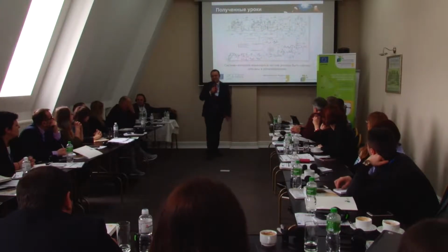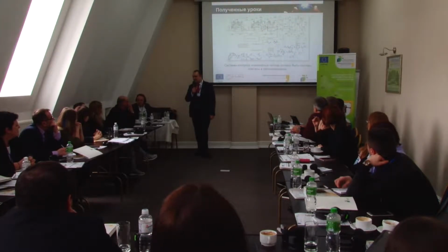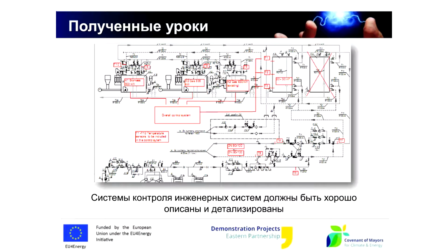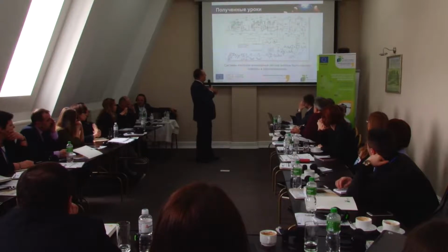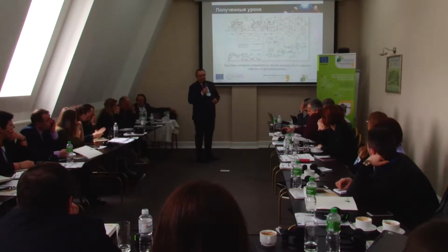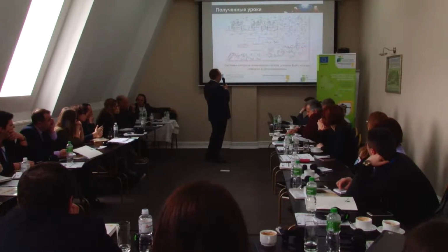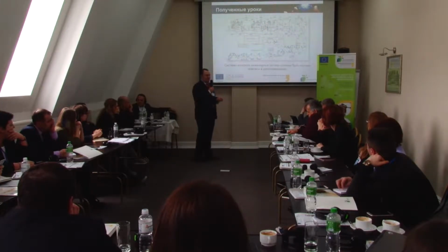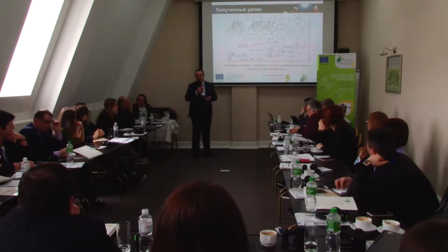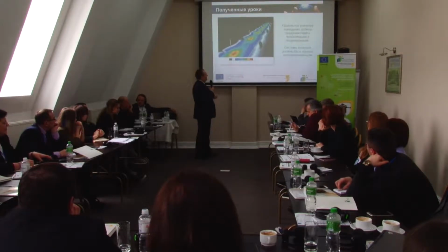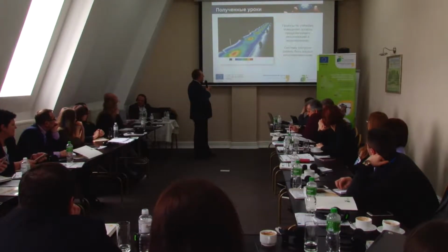Also, the general recommendation, which can be found in most technical design documents, concerns the bad description of the system of management of all the engineering systems. That's why your designer should describe in detail the principles and the algorithms of the functioning of the management system, of the control system, for everybody to have a clear idea as to what reacts to what, how something is closed, how something is opened. This will be necessary for the operating entity to know how to correctly use the equipment.